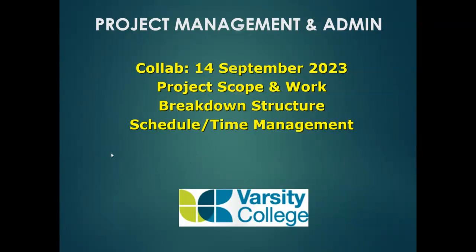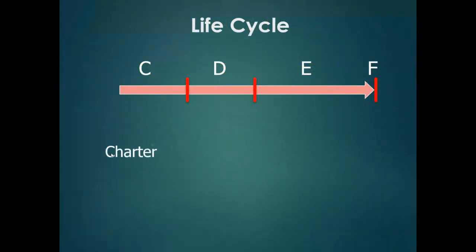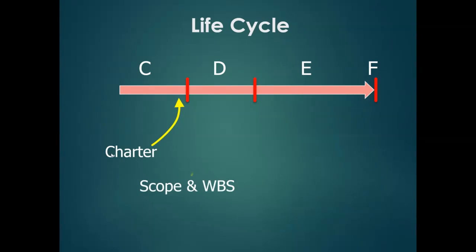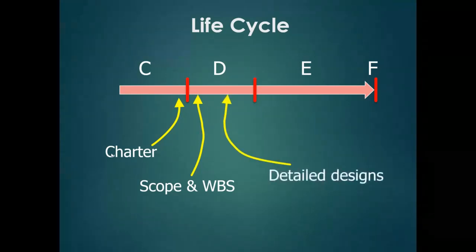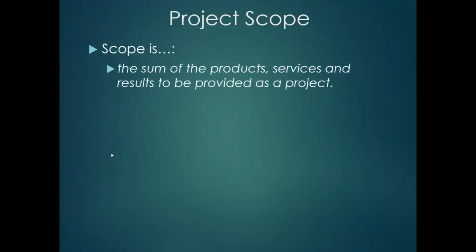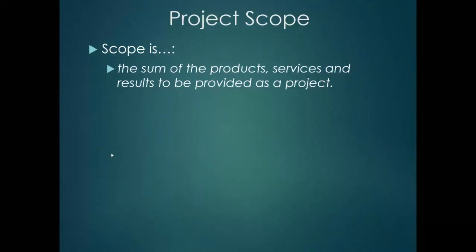Just a reminder of where we are. We've spoken about the project charter being done at the end of the project concept stage. That arrow represents the life cycle of the project — you've got four phases: concept, design, execute, and finish. The charter comes at the end of the concept stage, and then early on in the design phase you put together the scope and do a work breakdown structure.